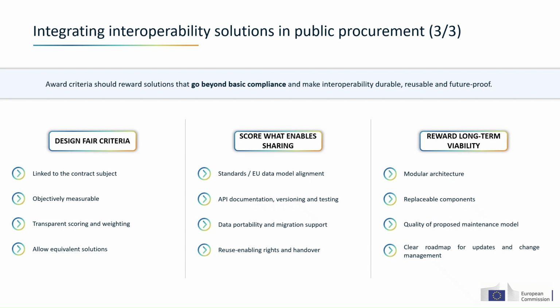To sum it up, use mandatory requirements for what is essential, but use award criteria to reward the offers that make interoperability easier in practice, that make it more portable, more maintainable, less dependent on one provider, and more reusable over time.